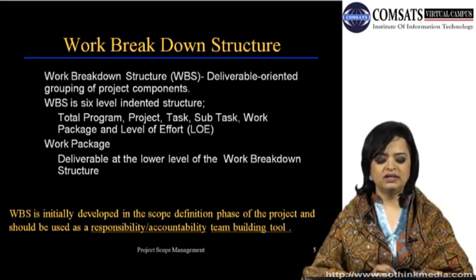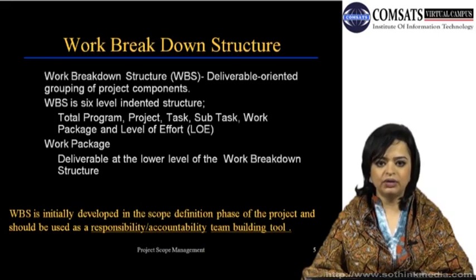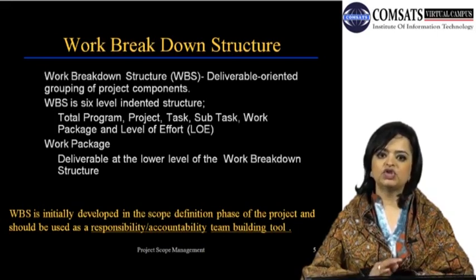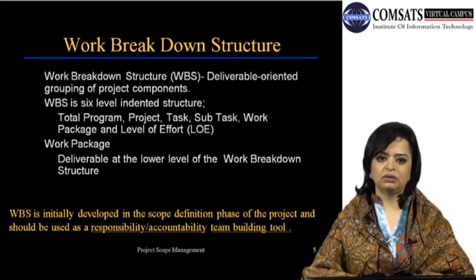Work package is the deliverable at the lower level of the work breakdown structure. Most of the time we do not take it down to the level of effort. We will just stop at the work package level. In most cases, depending on the complexity or the intensity of the project, we actually drill it down to the level of effort.